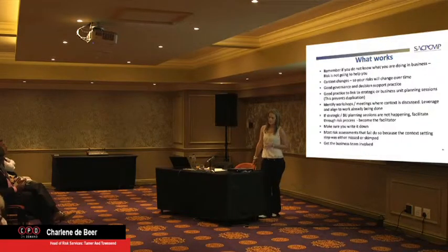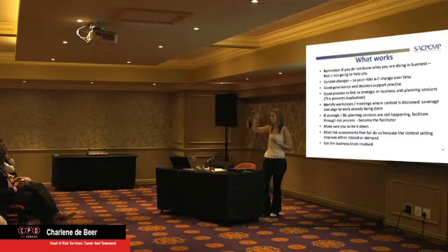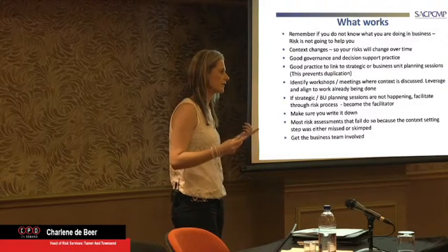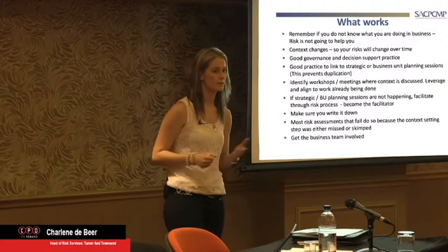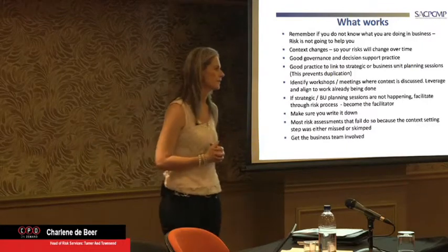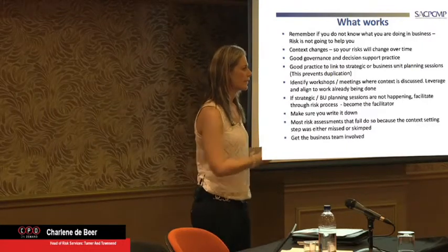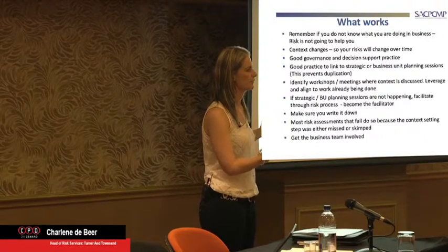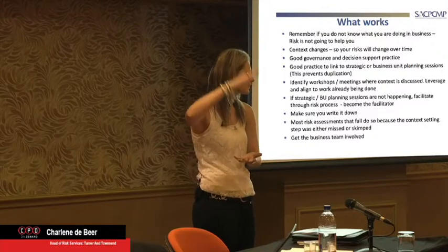And one thing we must always know that risk management aids in, which we don't always grasp that well, is that it builds history, because you never delete things from a risk register. You either close it or you move it to your completed actions, and it builds history over the months. If you do it correctly, when we go to adjudication or arbitration, which the majority of projects go to these days, which is quite sad, we can prove from our side that we've done all we could, or we did try a lot of things, and this is what we've put in place, and we've done X, Y, and Z.